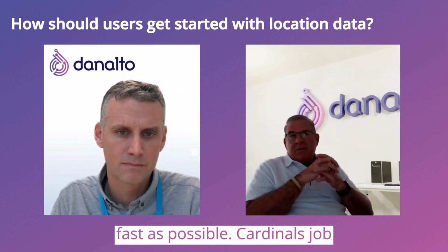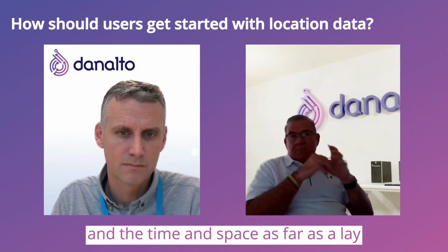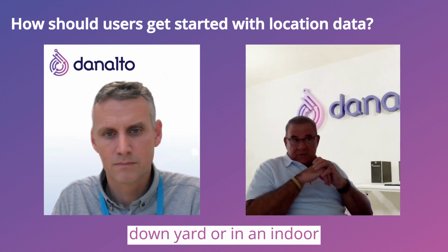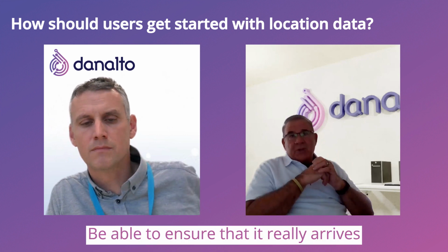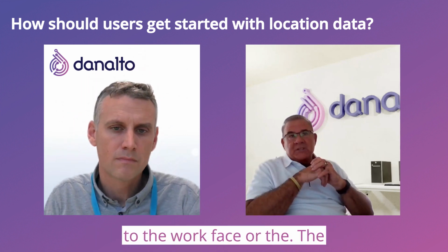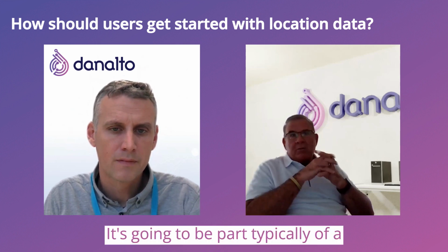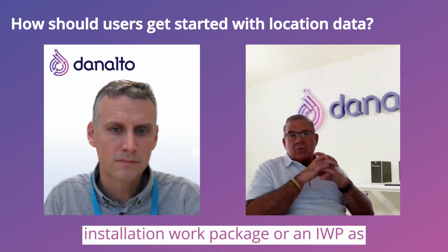Cardinal's job in this is to identify the asset in time and space, as far as a laydown yard or an indoor storage facility like a warehouse, and be able to ensure that it arrives to the work face or the site on time. It's going to be part typically of a pick list or an installation work package, or an IWP as they call it.